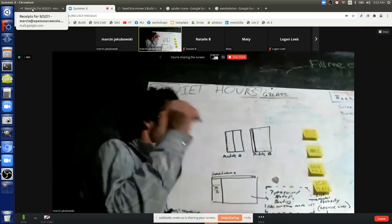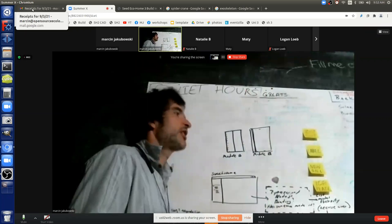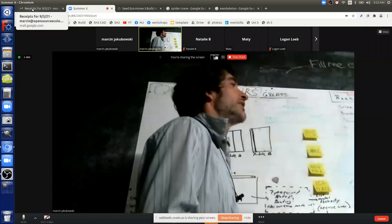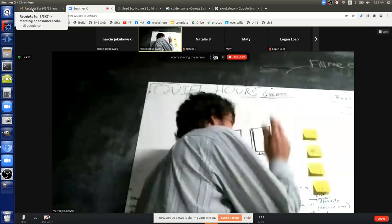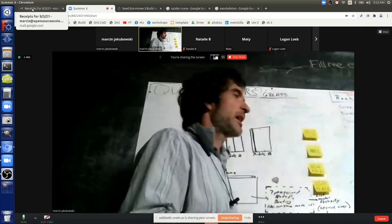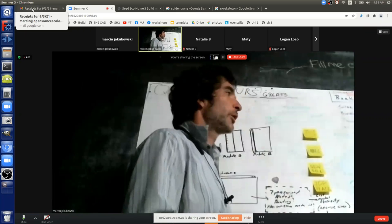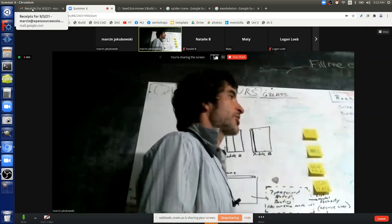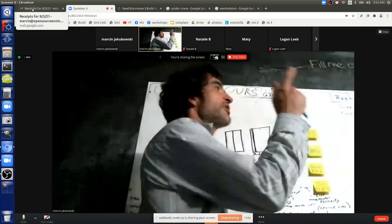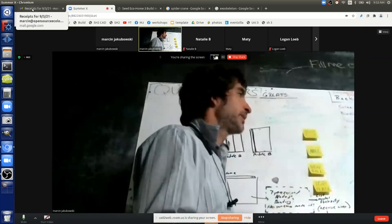Now we have the second house, the Seeker Home 2, which has got the shell right now, but the interior is not finished. So the suggestion was, let's work on all the interior stuff on that structure because we're going to take this one down. It's going to be very easy to take this one down. And we can do the electrical, the plumbing, the interior walls, the floor, the ceiling, some insulation, finishing up all the trim and doors and windows. Actually, the doors and windows we want to put in here too, to make a complete structure.